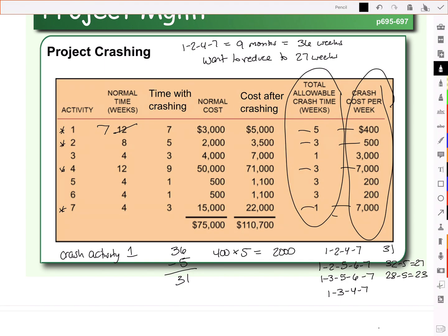1, 3, 4, 7. Before, took 8 months. So 32 weeks. And we just shaved 5 weeks off. So it's now 27 as well. So notice our critical path hasn't changed. It's still the longest path. So that's our minimum completion time. So by crashing activity 1, shortening it by 5 weeks, our completion time is now 31.